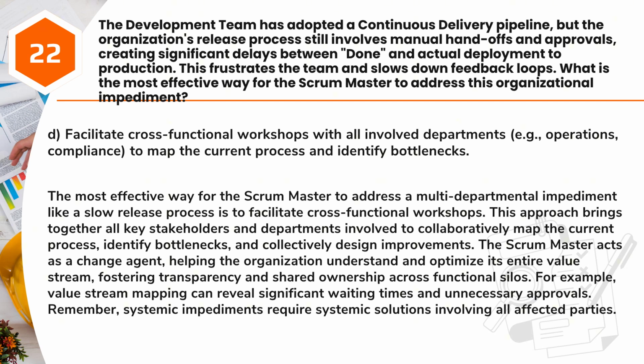The Scrum Master acts as a change agent, helping the organization understand and optimize its entire value stream, fostering transparency and shared ownership across functional silos. For example, value stream mapping can reveal significant waiting times and unnecessary approvals. Remember, systemic impediments require systemic solutions involving all affected parties.